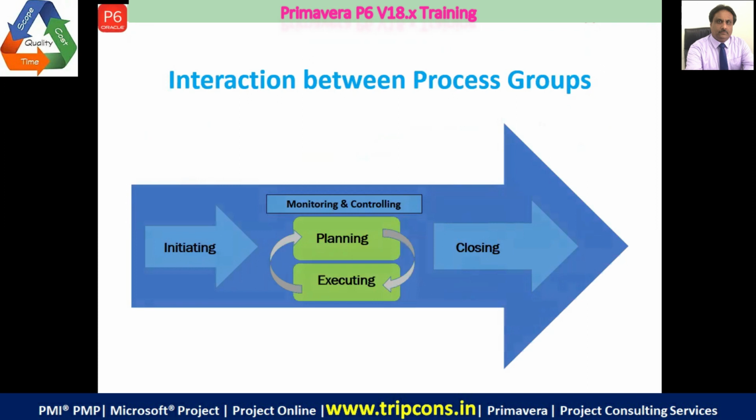Once in a while you go from the execution to planning in case there is a change request. So what is a change request? If we go back to the restaurant example, if four more colleagues join you and you call the waiter to your group table once again and ask him to note four more items to the given order, that is called a change request. We might also have such a situation, which is fine, but we should not miss any requirement.